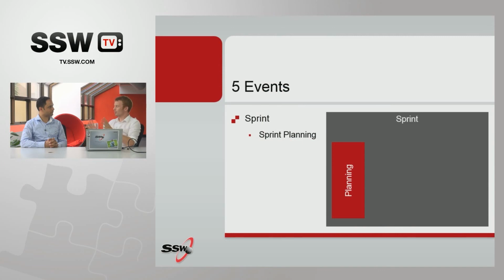So there's two parts to the sprint planning. The first part is the what. Okay. So the what is the conversation that you have with the product owner. Yes. Okay. So when we go back to Scrum and saying that it's trying to get you to do things underneath the surface, the purpose of the sprint planning what meeting is to start a communication. Okay. So when you're having that communication with your video team, it was allowing you to look at the items on the backlog. Okay, and it was allowing you then to have that conversation with them to say what you would like, and then them to have the conversation with you, the reverse, and say, oh, this is maybe what we can do.